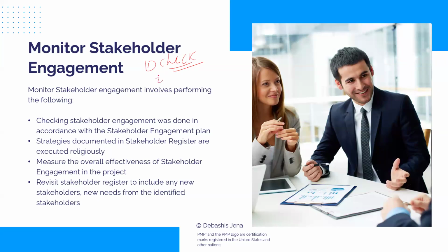And the second thing you do is you identify more stakeholders. See, we had the process named identify stakeholders, which we performed in the initiation stage itself. Now, I'm sure you appreciate as the project progresses, new stakeholders would come into the picture. So we cannot only once identify and forget. We'll have to continue identification of stakeholders. These new stakeholders would have new needs that we need to cater to. So that's the second thing I do here.